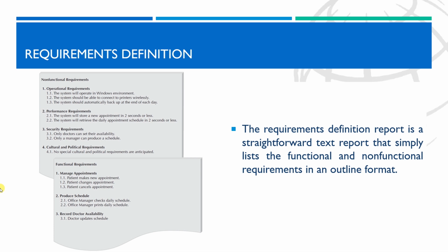The most obvious purpose of the requirements definition is to provide the information needed by the other deliverables in analysis, which include functional, structural, and behavioral models, and to support activities in design. The most important purpose of the requirements definition, however, is to define the scope of the system. The document describes to the analyst exactly what the system needs to end up doing. When discrepancies arise, the document serves as the place to go for clarification, and this is the most important thing.